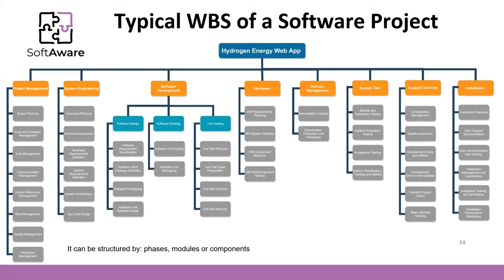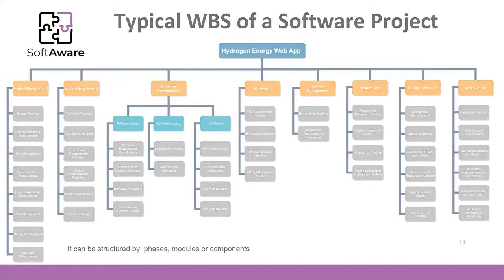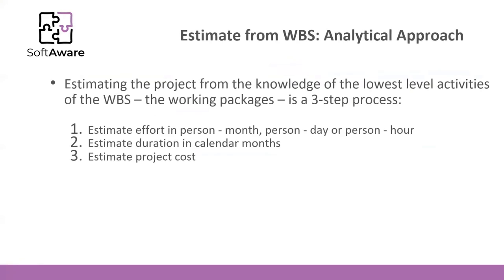A work package designates a full description of what, who, and when it is like from work. This is the basis of time planning and cost planning — estimating the project from the knowledge of the lowest level activities of the WBS, the work packages.